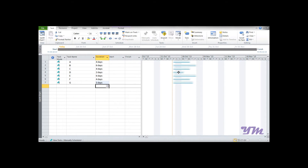The light blue shade indicates that the tasks are manually scheduled. Manually scheduled means the project cannot automatically adjust the dates or durations with respect to the calendar. The primary thing that needs to be done after entering task name and duration is to convert it into Auto Schedule mode.